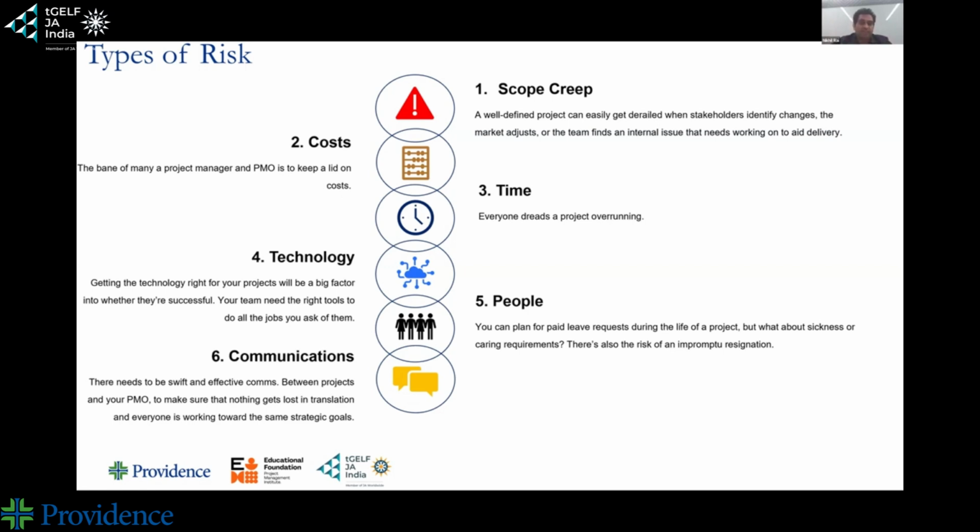Or there may be times you may just have to put your foot down and say, you know what, I'm already 60, 70% in. I can't deliver it to you right now. But once I deliver this at 100%, let me come back to you as a project 1.1 or 2.0, where we will go back and fix some of these things. But that's going to be a separate topic and a separate project that's going to build on top of the first delivery. So you can go either of two ways, right? You don't want to say a blank no. You may want to find a way to find the middle ground. So like I said, communication is what will help you.